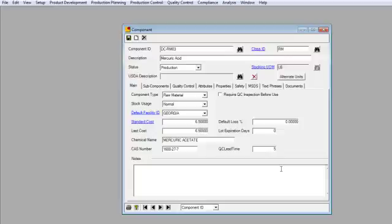So if I had a seven-day lead time from the supplier and a five-day lead time for quality, I would have a 12-day lead time that MRP is using to determine when a product needs to be here, and therefore when the purchase order, or for that matter, a batch ticket needs to be generated to get that inventory here on time.